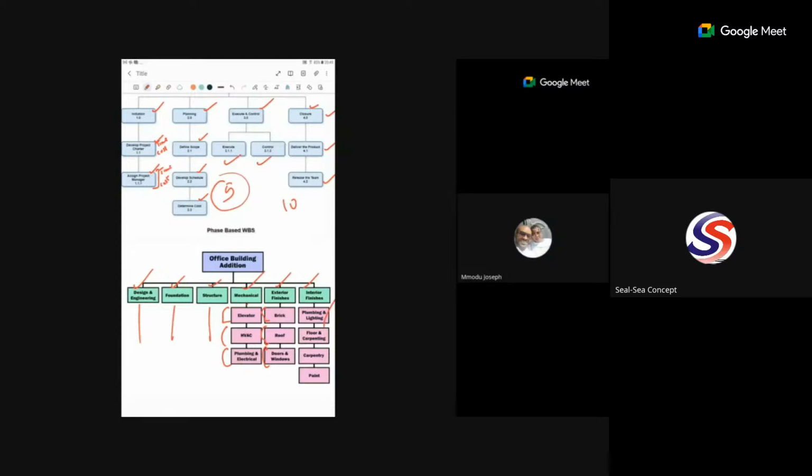Another thing is that if you are giving your team a task that will take them 20 days, and you say, I want you to deliver it within 5 days. And they complain to you, saying, well, what are you talking about? What is the thing you want to do? You say, is it not this simple thing? You can deliver it within 5 days. Because you have not taken your time to break down that particular task and see a whole lot of sub-tasks, or smaller tasks that will need to be done before you can carry out that task.